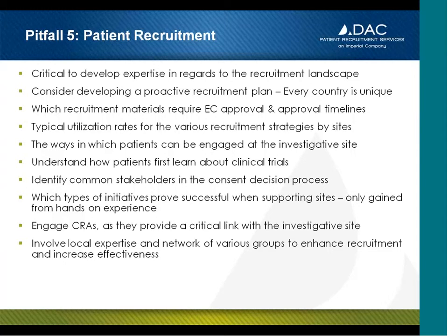With global trials, take into consideration country-specific needs and the differences in standard of care in your recruitment plans. This will allow for more realistic enrollment goals to be set for sites, taking into account your clinical trial authorization and ethics committee approval timelines, as well as the import license timing, depending on if they are submitted in parallel or sequentially. And make sure that your regulatory team members weigh in on that very early so you can really bank on that timing and build that into your timelines up front.